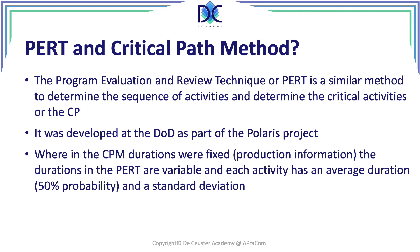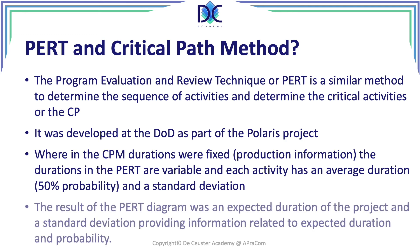Today we still refer to the PERT method, and a PERT diagram can be used for either an arrow diagram or a precedence diagram. The end result of the PERT calculation is an expected project duration and a standard deviation, introducing uncertainty into duration estimation. For example, the expected critical path duration plus one standard deviation gives an 84% probability that the project will finish within that time, providing much more useful information about the project.